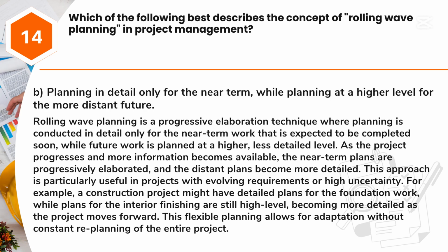For example, a construction project might have detailed plans for the foundation work, while plans for the interior finishing are still high-level, becoming more detailed as the project moves forward. This flexible planning allows for adaptation without constant replanning of the entire project.